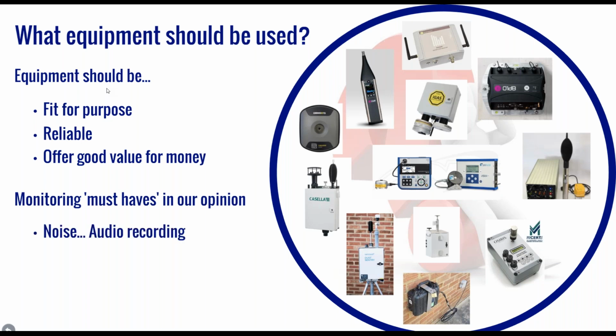For noise, monitoring devices should be capable of recording audio. This is necessary to differentiate between construction and non-construction related events in the event of any potential litigation claims. And a common example that we often come across is if you've got a site that's located close to a main road, it's not uncommon to have things like motorbike pass-bys or emergency sirens which trigger off alerts, which clearly aren't construction related. So where we do have audio recording, we're able to disregard those events.